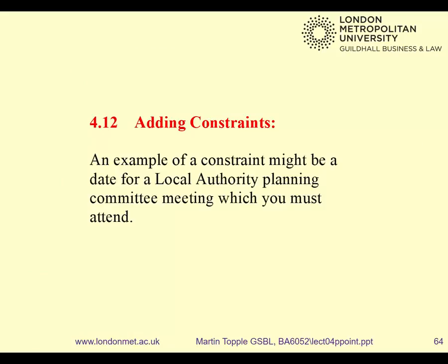Now, adding constraints. The last thing that you'll be doing today is adding in some constraints. And I'll give you an example of a constraint. Suppose you are building that 3-bedroom house and you've got to attend a local authority planning meeting. Well, suppose your house building is running a bit late. Can you ring up the local authority and say, excuse me, could you delay your local authority planning meeting by a couple of weeks? I'm not ready. When they finish laughing, what will they say? No. Nobody on earth can change a local authority planning meeting date. It's set in complete concrete or stone.